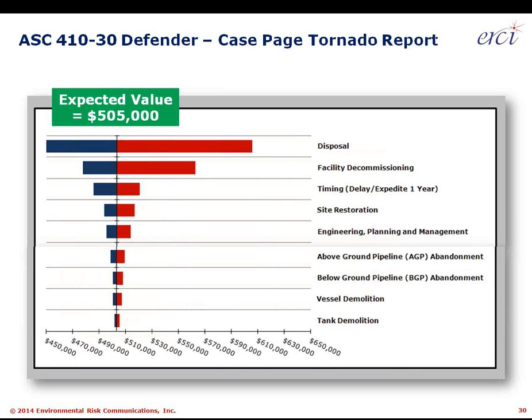They provide a tornado diagram that lets a user on the back end say, okay, here is what my expected value was. Some of these assumptions, these Monte Carlo modeling items, had a big impact on what the cost range was for this project. Others didn't really have an impact at all. It doesn't mean that they were significantly larger or smaller costs. It means that the standard deviation around them, combined with the magnitude of the cost, had the biggest impact on expected value for the full project.